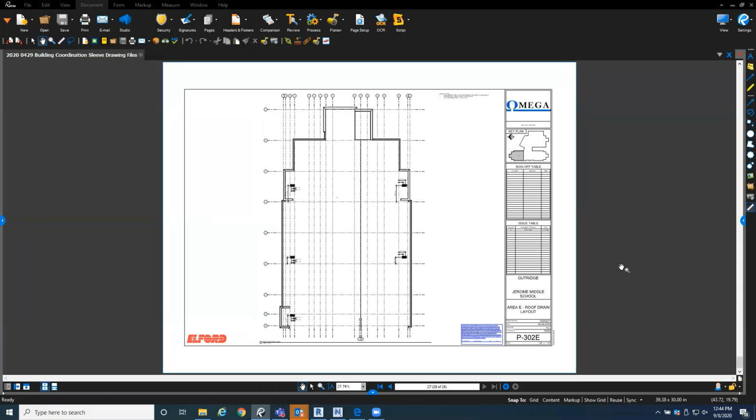Yeah. Anybody else want to interject? For any wood structure framing, I know over here on the West Coast that we have a few contractors, strictly framing contractors, that are using StruxSoft solutions. The product is called MWF ProWood, as one of the programs that helps them to be able to frame a Revit model rather quickly. The challenge, of course, because there's always a challenge, is that the models that they receive have to be at a very high level of completion before they can get moving with their stuff.